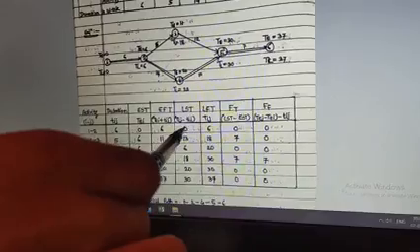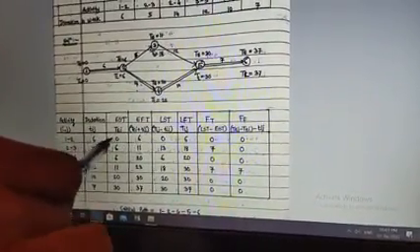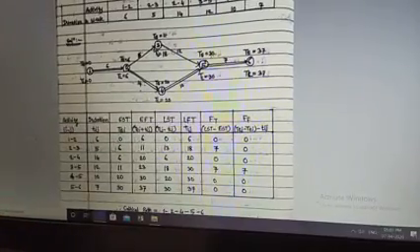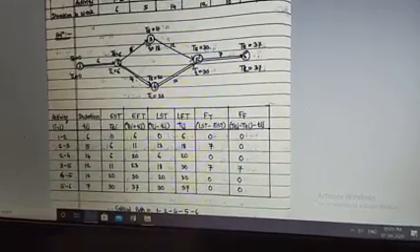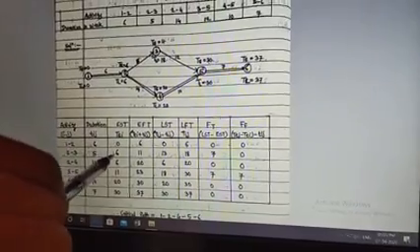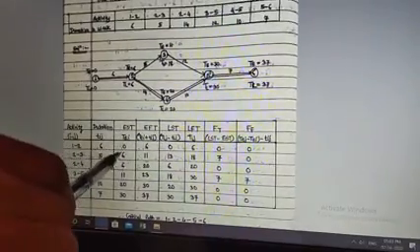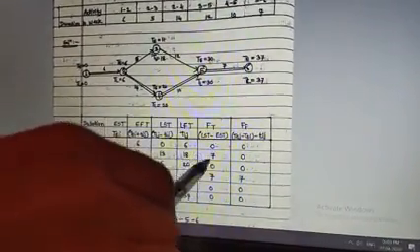It is very simple. Now for the first activity, what is the LST number? 0. And for the same activity the EST number is 0. So 0 minus 0 is 0. In the same manner, the next activity we have is 2 to 3. So again LST minus EST. What is the LST value? 13, and here the EST value is 6. So 13 minus 6 is 7.